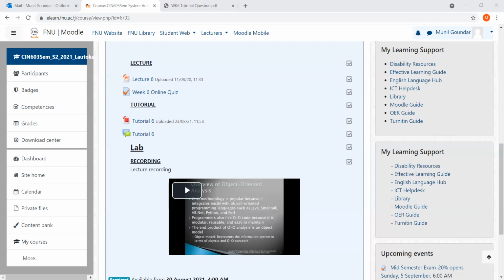After that, you have activity H. So activity H is dependent on F and G. So F and G, okay? And if you look at finish date, one finishes on the 16th of July and the other one finishes on the 8th. So you'll have to again reconsider that unless and until both the activities are completed, you cannot proceed. So therefore, this will be 16th of July, 21, plus 3, 19, minus 1 will give you 18th of July. So this is your duration date.